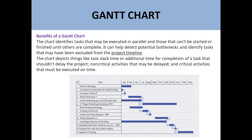The Gantt chart is very beneficial to understand the dependencies among activities, to identify slack time, to identify activities which can be done in parallel or in sequential order, and to identify critical and non-critical activities. Basically, it is a simple way to represent tasks on the left side with bars corresponding to calendar dates. This is the basic concept of the Gantt chart.